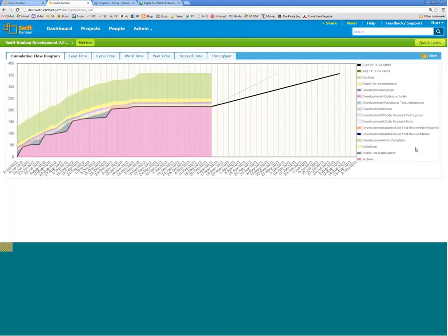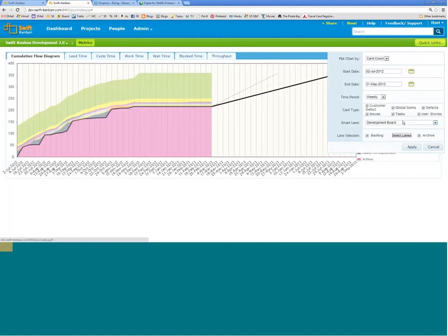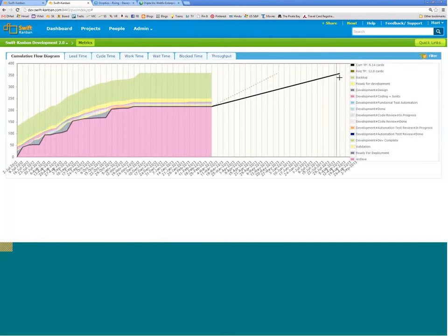It tells me that I am currently going at 6.6 cards a week, which is obviously past data and will not change. But because my inventory changed, my required throughput now needs to be 12 cards.